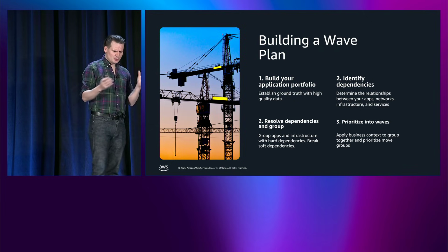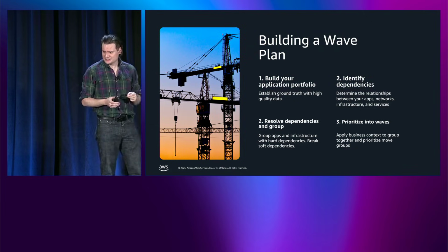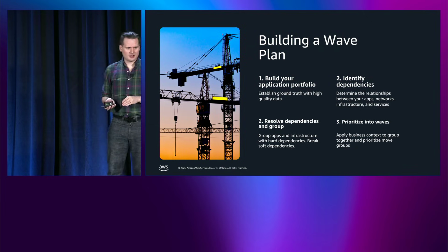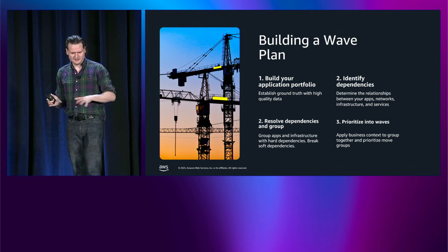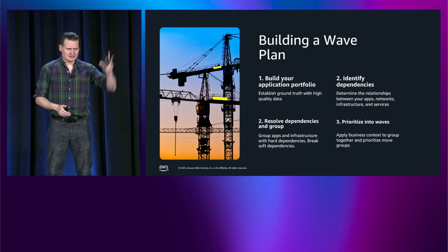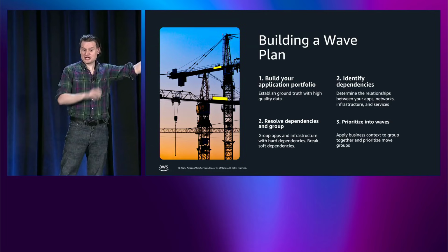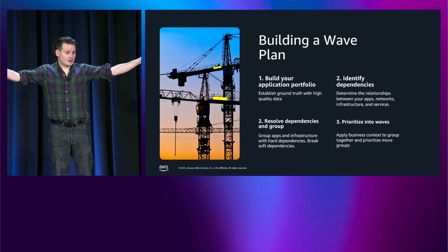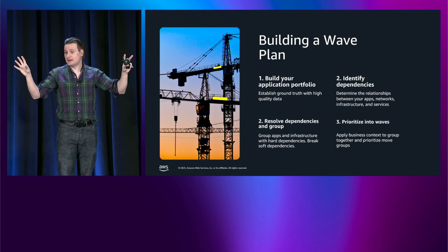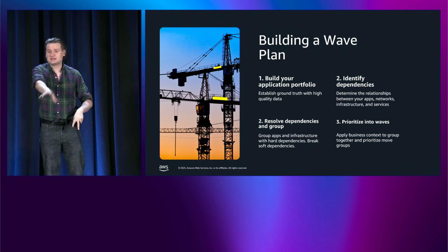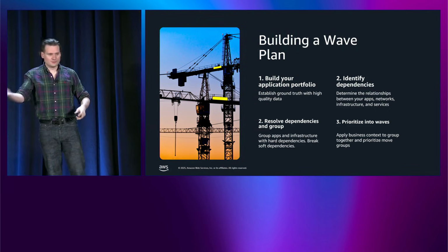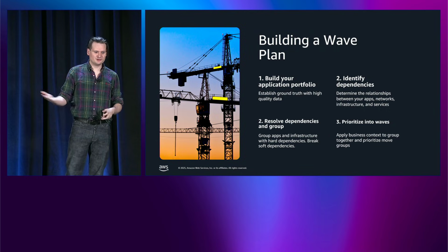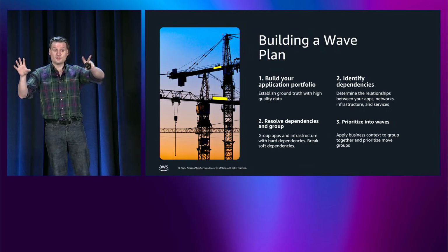Once you've established that, which I'll call an app for simplicity's sake, the question then becomes, what are the dependencies between those apps? And that's where your dependency analysis starts to feed into this. What I want to know is that my application over here has a shared database with my application over there. I can't move these apps independently because they both have dependencies on stored procedures in this database. If I move them apart, something will break, critical business functionality will go away. So I need to move those together.